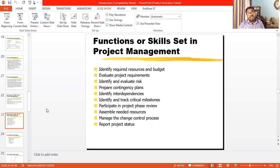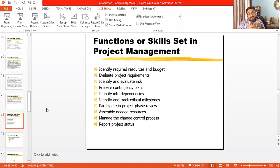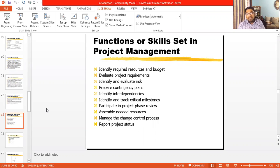Project management will help you participate in project phase review. There are phases in a project lifecycle. At each phase and each interval, you need to evaluate your progress and success. If the first phase is all right, proceed to the second. If not, rectify the first phase before moving on. If you carry problems forward into the second, third, and fourth phases without resolving them, your project will never ensure quality.